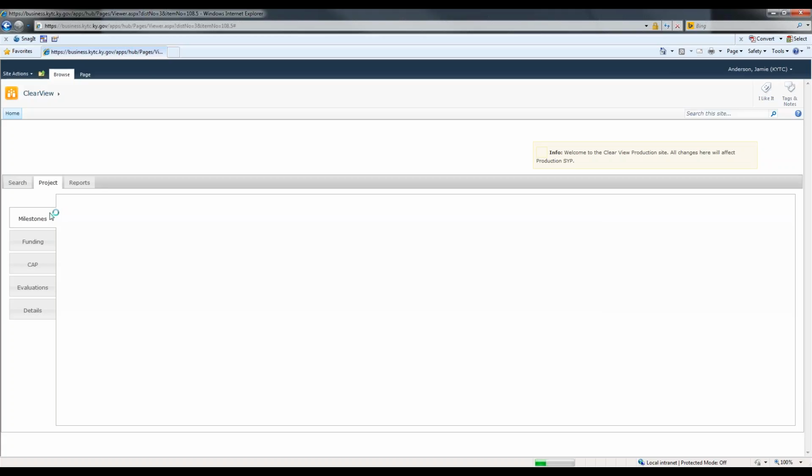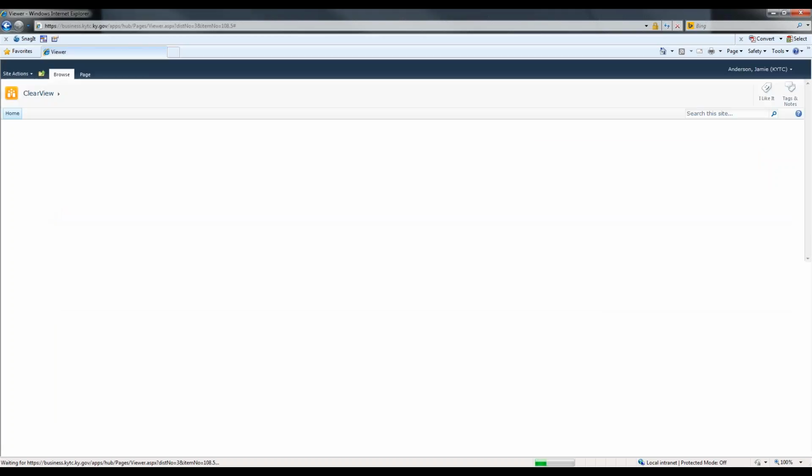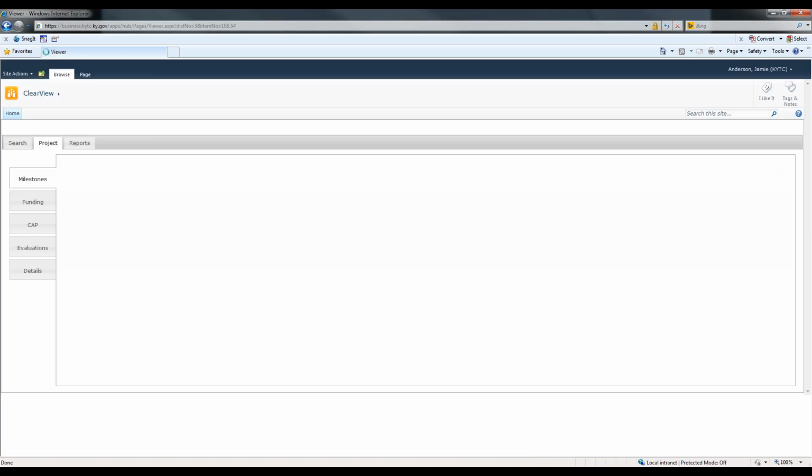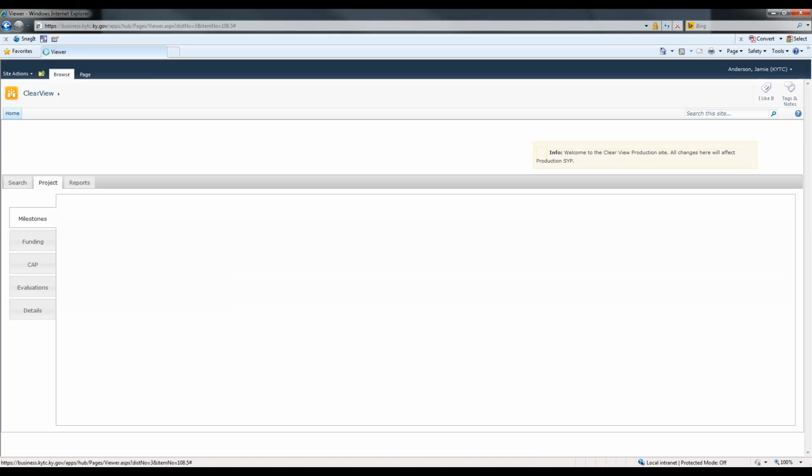Another thing I wanted to point out is you might notice when you open up some of your projects that not all the milestones are displayed on the screen. Any milestones that have not been set to not required are hidden. So to view all the milestones, you'll want to click on the Show button in the top right of the screen. As your project moves forward and milestones are scheduled and revised, this is where you will input these dates.